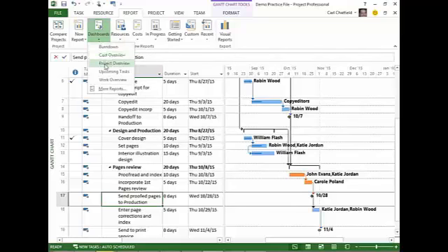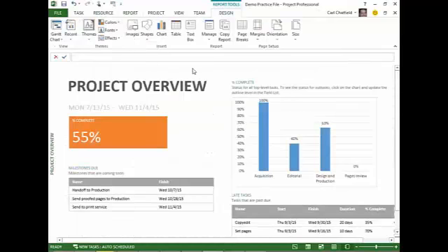So I'm just going to show you a few. If you haven't seen reports in 2013 before, you've never seen anything like this in Project. This is live project data. This will of course be constantly refreshed as my MPP data changes. As with the old reports, I don't directly edit the underlying data here. I can't change assignments. I can't record progress on tasks and so on. What I can do is pretty substantially affect how that data is presented, formatted, and I have some great capabilities for sharing this data with other applications.